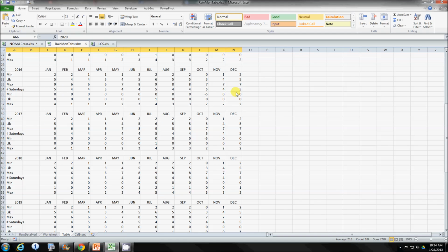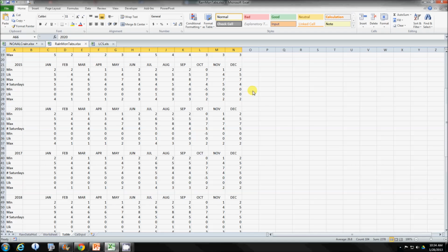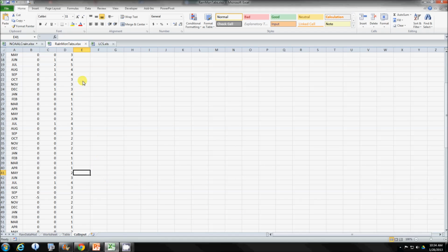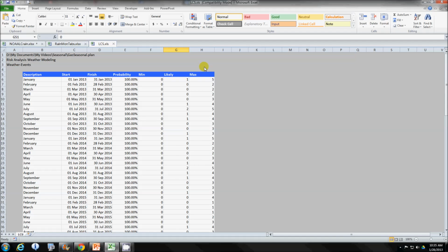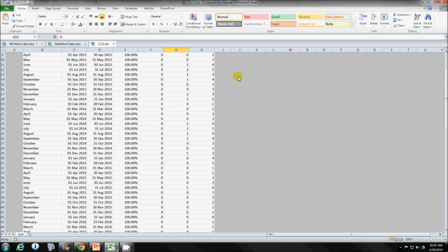Now we're doing something pretty close to what we did before with rain delays. The difference here is, instead of doing plus or minus 2 days, we are actually calculating the number of the P10, the min and the max, using now the subtracting the number of Saturdays in that particular month. And so then we get the output here, and then from this output we now have our normal table. This is, at this point now forward, going to be exactly what we did for rain delay.